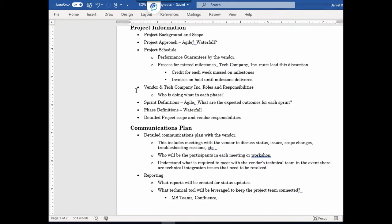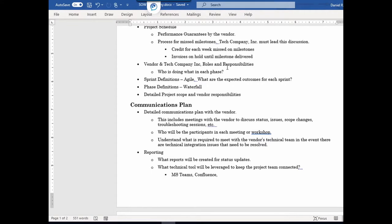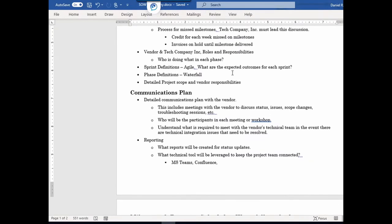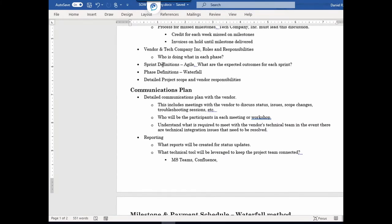Another thing is roles and responsibilities — you want to make sure everybody knows what they're doing, with no misunderstanding on who's working on what, especially when it comes to the phases. You want people to be clear on what they're working on in each phase. If you're using Agile, you want to define what the expected outcomes are for each sprint — basically, the definition of done. You definitely want to sit down with the vendor, go over this, and confirm it through the SOW, because this can lead to a lot of misunderstandings, especially working with Agile.